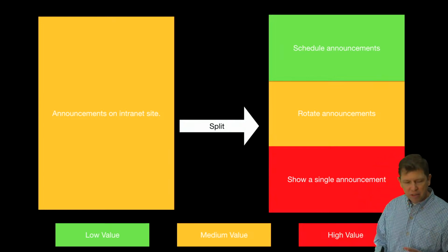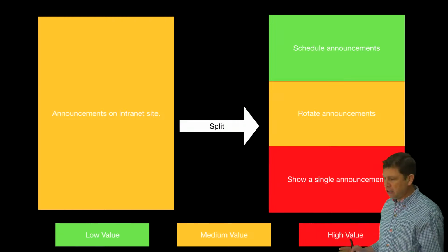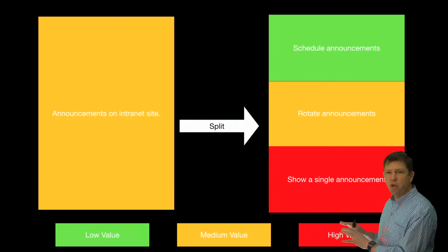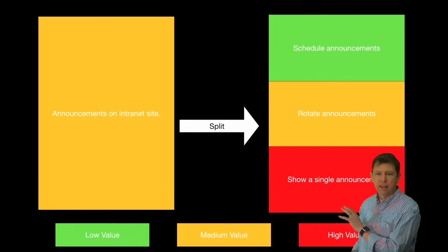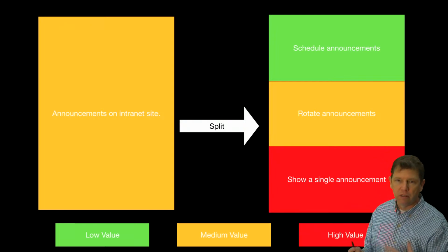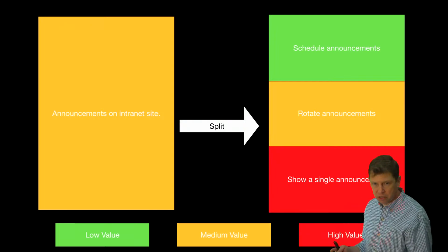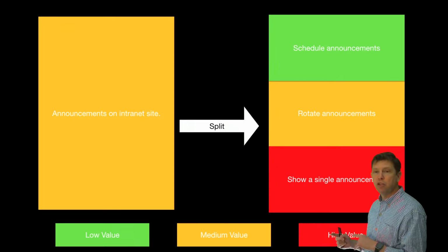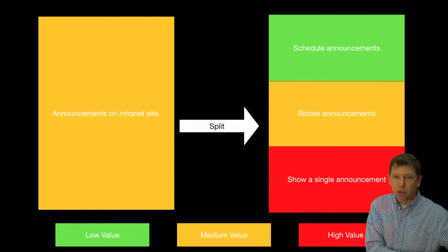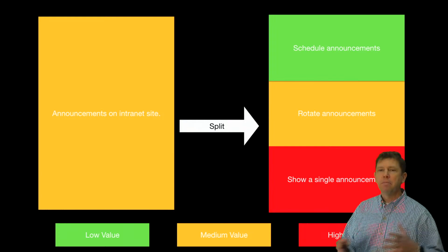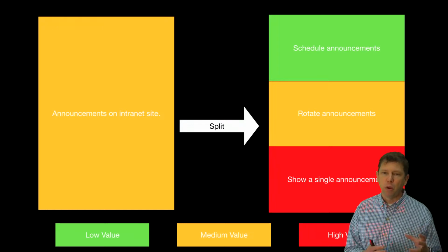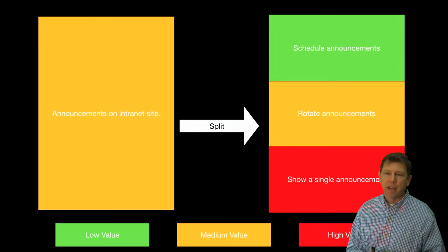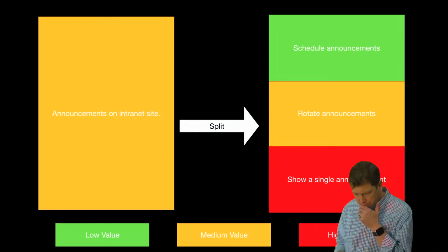And what he said, and this was a beautiful example of splitting stories at work, he said, oh, no, we don't want to do any of those other things now. He said, this worked so well, by splitting it up like this, you gave us 90% of what was valuable, or 95% of what was valuable in this story. The other stuff at this point in time is low enough value that we would rather you do the same magic on this other story we have over here. So he had something else that he wanted to see, can we find the thing that's really, really valuable and get it done in a day or two, instead of going on with everything that they had planned here.